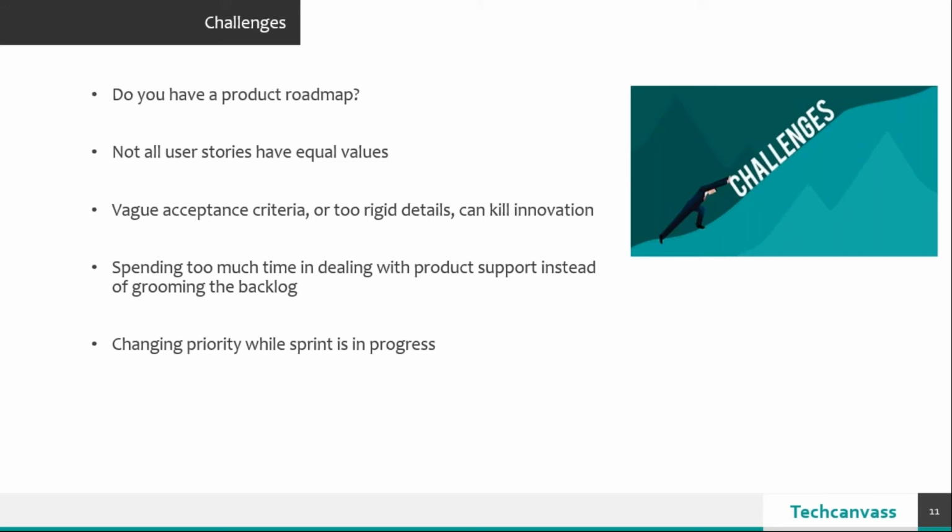You can add it in your backlog, and then in the backlog refinement or backlog grooming session you can prioritize it. It's not that, since I know this epic has to go live next month, and this epic has 6 user stories, it is not okay if all 6 are not going. I can at least draw the line, what is the minimum viable product or the minimum viable feature within that epic, and just try to push them live.